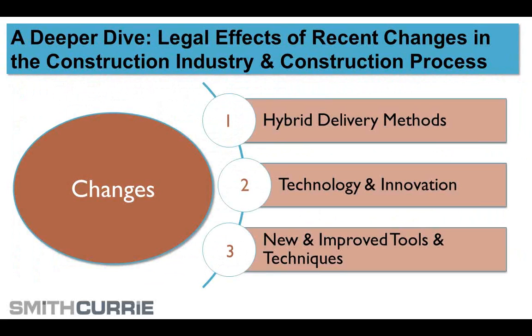Are you now just a subcontractor? Are you now a designer? Or what if, let's make it even more subtle. What if all you're doing is hiring somebody to do the design and reviewing what they did, or maybe even reviewing the design somebody else did? You need to now be thinking about buying professional liability insurance because you are now a designer. Those are the kinds of issues that you need to think about.